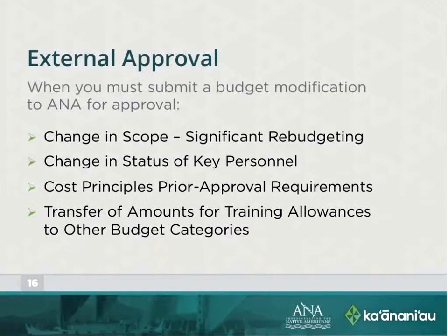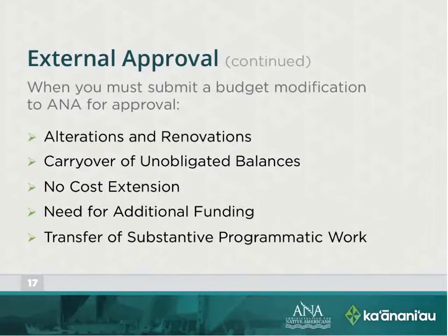Okay, the next slide talks about alterations and renovations. Usually this is addressed in the funding opportunity announcement, and for A&R, for the most part, the alterations or renovations have to be incidental and minor, and it has to be under a certain dollar amount. I think it's whichever is less, $150,000 or 25% of the total project cost, which includes non-federal share. But it cannot be construction, and anything above that would be considered major renovation. So it really has to be incidental.